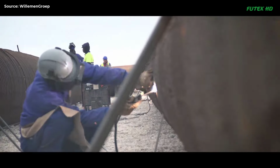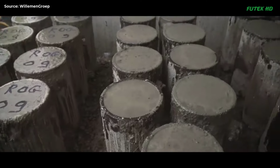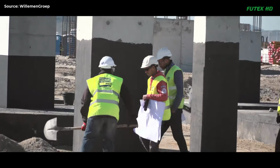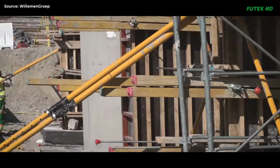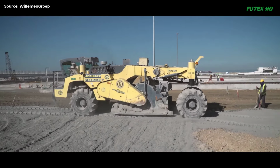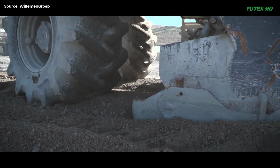To ensure perfect leveling of the foundation beams for the stacking cranes, Villamine and its partners designed a patented custom-built, laser-guided concrete grinder and core drilling machine. This innovative method allowed rails to be mounted straight on the prepared concrete beams without traditional, time-consuming leveling methods. After welding the individual units into one continuous rail, they were bolted to the foundation beams and checked for verticality and parallelism. The key area needed to support 12 Super Post Panamax rail-mounted ship-to-shore cranes, each weighing about 3,000 tons.